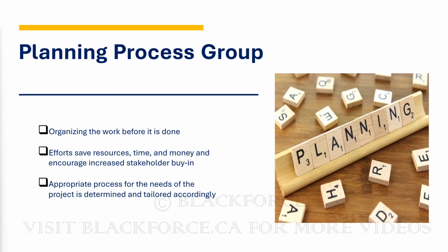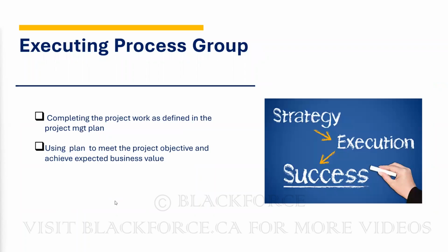This is our plan. But that can take time sometimes because you might be going back and forth. The stakeholder might say, no, 2 years is too long. Can you do something about it? You go back again and look at your plan. Can you add more resources? If you add more resources, your costing will go up. You go back to the stakeholder: if you want us to do it in 1 year, we have to add more resources, and our estimates will increase in terms of the costing. You go back and forth till you agree. But when everyone has agreed, you must have the buy-in of your stakeholders. Everyone has agreed, then you can now start executing the work.